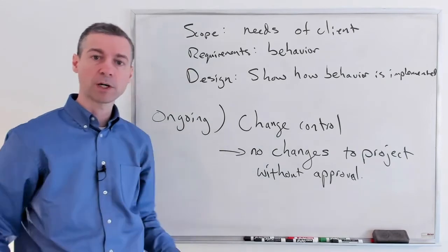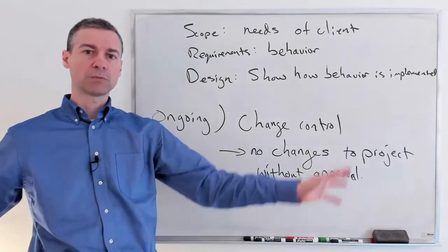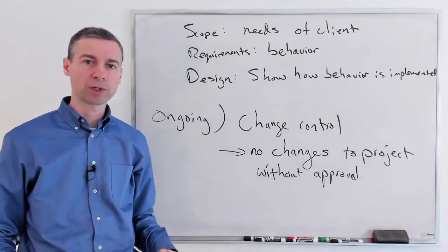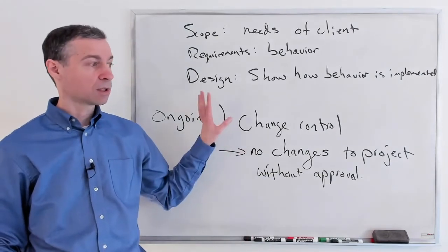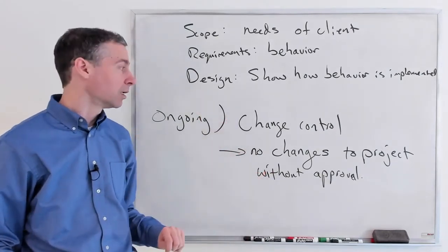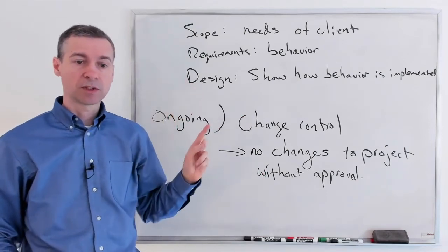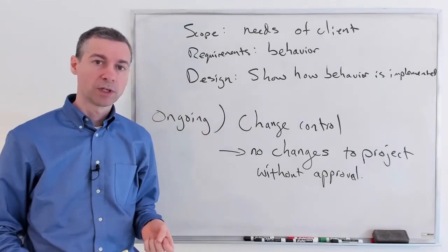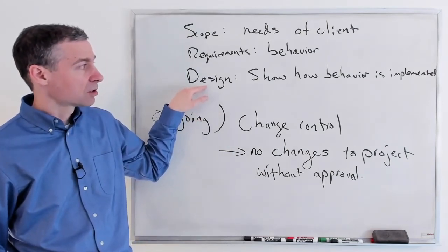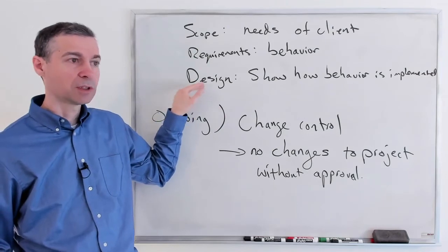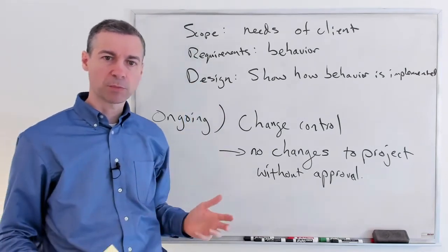Because once that requirement specification is written, many more resources are going to be deployed on the project, a lot more work, things are going to get real expensive, changes are going to be really bad. You're also likely to see in a traditional consulting approach that at this stage, you might break a project up into parts.